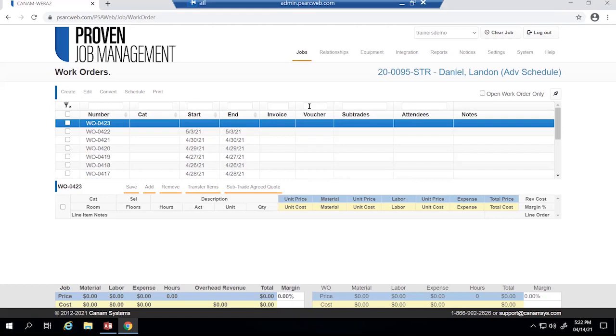You can use that default work order as a placeholder for scheduling purposes. It is not mandatory to create uniquely defined work orders because the advanced scheduling tool does allow you the ability to schedule the same work order as many times as needed, as long as the work order remains open.